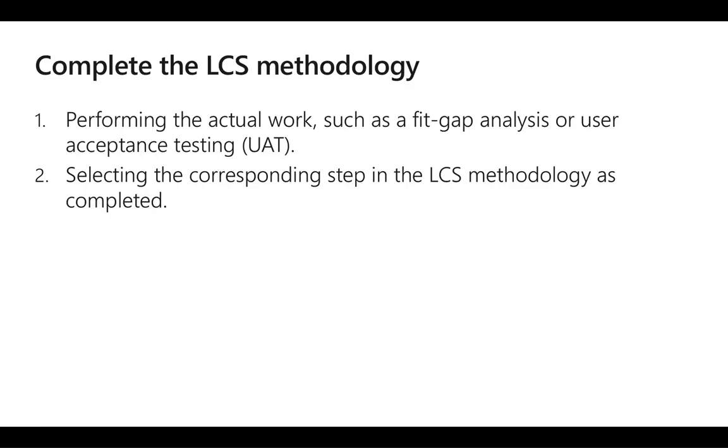Customers must complete the analysis, design, develop, and test phases in the lifecycle service methodology before the configure button that is used to request the production environment becomes available.